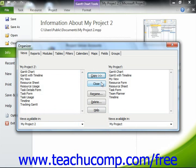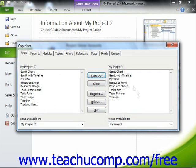While you have the Organizer window open, note the other functions that are available within this dialog box. You can click the Close or Cancel toggle button to close the dialog box. You can also use the Rename and Delete buttons to rename or delete selected items in the lists. This is a very handy way of deleting custom views that you have created by accident from the list of available views within a project file. Also note that you can select items from the right list and then click the Copy button to copy items from the right list to the left list if desired.